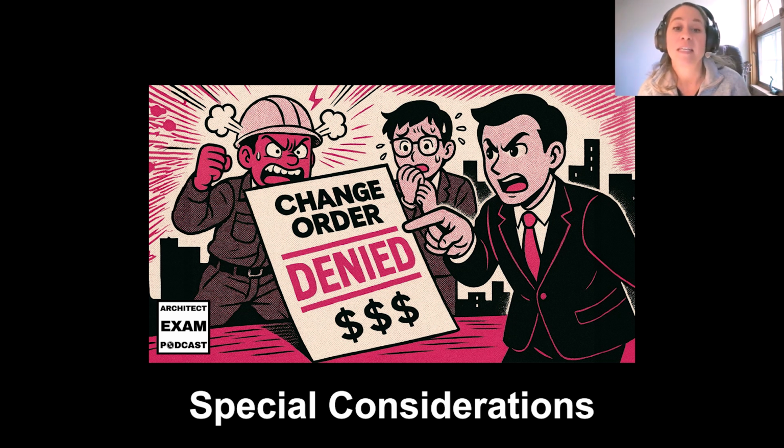There are also the IPD project deliveries, the integrated project delivery method. It has a shared risk and reward structure with different incentives that may reduce claims, because the goal is to have everyone working together on the project's success. Based on that style, it really is going to tell you if there are more or fewer claims, and that's also based on how large or complex the project is. Finally, we wanted to touch on indemnification clauses with this topic because there is an important risk transfer in indemnity and these clauses. Indemnification transfers risk in contracts in a way that provides protection against third-party claims.